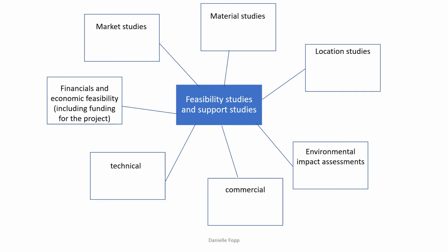They cover environmental conditions in the area surrounding the potential site, alternative sites, and impact analysis of any predicted potential detrimental environmental impacts of the proposed project. In a feasibility study, the commercial, technical, financial prerequisites for a project will be defined and examined. And this is conducted on the basis of alternative solutions which have already been reviewed in the pre-feasibility phase.